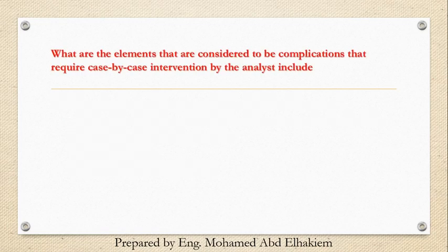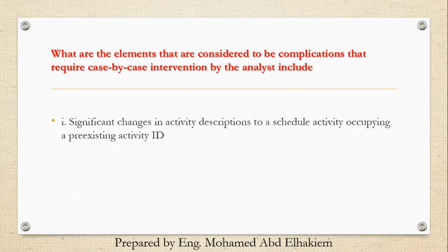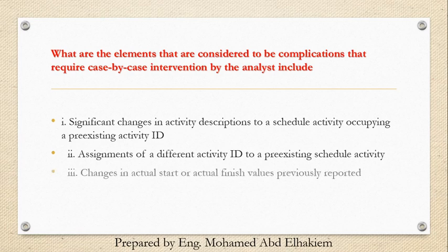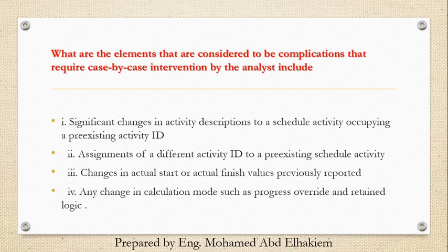What are the elements considered to be complications that require case-by-case intervention by the analyst? Significant changes in activity descriptions to a schedule activity occupying a pre-existing activity ID. Assignments of a different activity ID to a pre-existing schedule activity. Changes in actual start or actual finish values previously reported. Any change in calculation mode, such as progress override and retain logic.